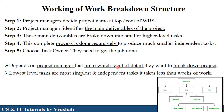Generally, the project manager decides how many modules are in a particular project, how many tasks, and how many WBS levels. This is all decided by the project manager. At the end, subtasks are also divided into different work packages. A work package is the smallest task performed at the end of a particular project — this denotes the end of the WBS structure. After generating the WBS structure, the project manager chooses a task owner, meaning they assign a particular task to a particular team lead or team member.